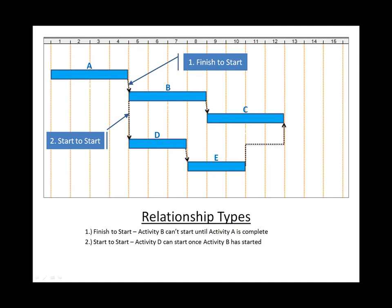Next is the start to start relationship. The start to start in this diagram says that activity D can start once activity B has started.